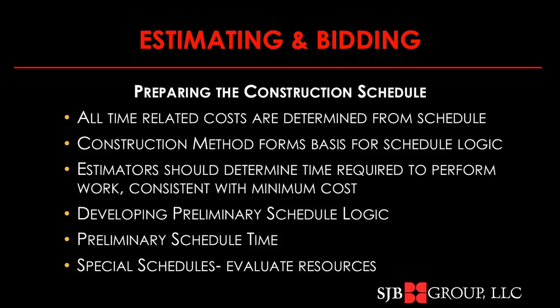Your equipment loaded schedules are important because in preparing our estimate, we're going to have to recover in our bid price the cost of having equipment on hand while it is not being used, in addition to the time it is being used. And as I mentioned earlier, that can affect cash flow for the project.